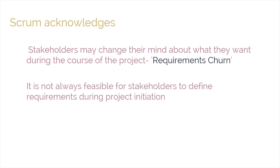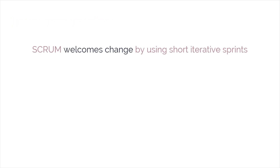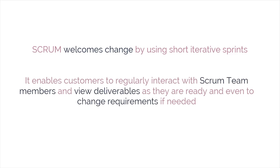Scrum projects welcome change by using short, iterative sprints that incorporate customer feedback on each sprint's deliverables. This enables the customer to regularly interact with the Scrum team members, view deliverables as they are ready, and change requirements if needed earlier in the sprint. Also, portfolio or program management teams can respond to change requests pertaining to Scrum projects applicable at their level.